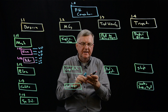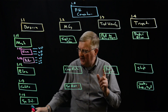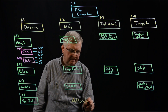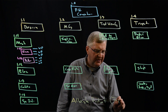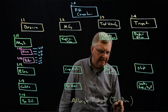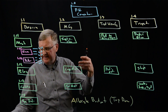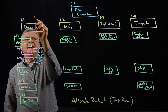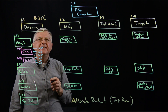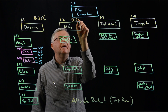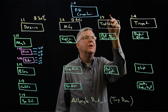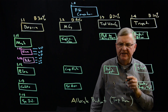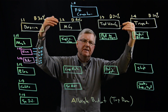Together, this represents the entire project the project manager is managing. It also helps us allocate budget using a process called the top-down process. If we know how much money we can spend, the project manager can look at this structure and determine: 30% on mechanical design, 40% on manufacturing, 20% on testing, and the final 10% on transport — essentially imposing the budget on the various tasks.